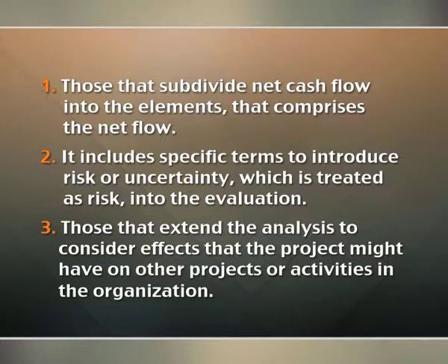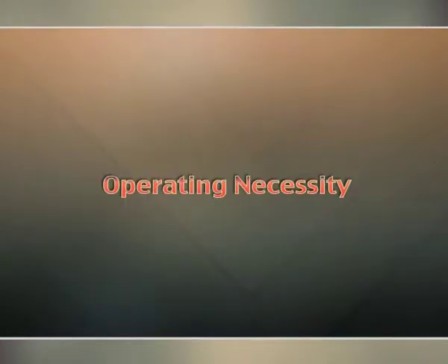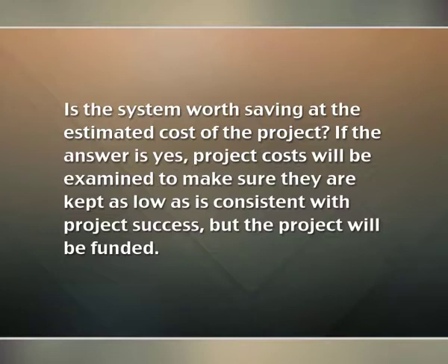Operating necessity. If the project is required in order to keep the system operating, the primary question becomes, is the system worth saving at the estimated cost of the project? If the answer is yes, project costs will be examined to make sure they are kept as low as is consistent with project success, but the project will be funded.